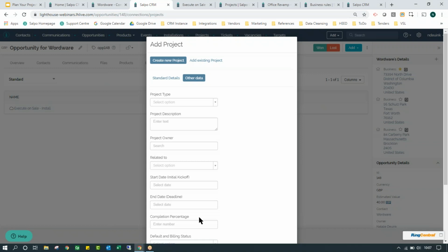And then I want to do a calculation between the difference of the proposed end date and the actual completed end date. I can start building out fields. Once I identify the types of projects I'm going to be creating and using in the system, I can really start defining those fields to reflect what's required.